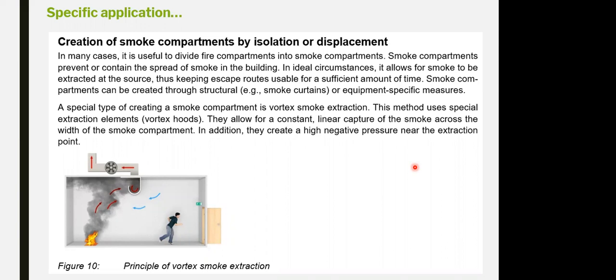For the as-built, the supplier of the extract system or the jet fans has to submit the same CFD based on the fans and the air exchange per hour, the selection for the airflow, the CFM, and making the simulation based on the selected fans itself. Starting from the jet fans to the axial fans and the shaft extracting outside the building. So I have to submit in 2 cases.